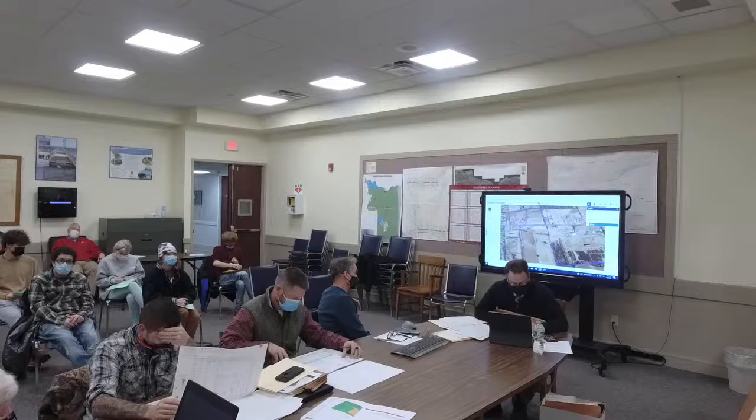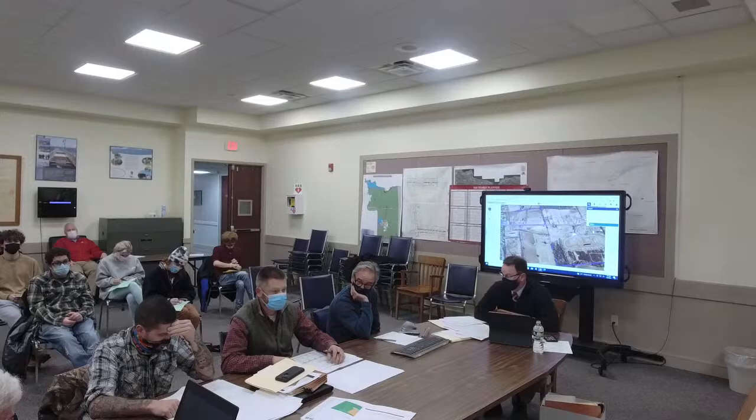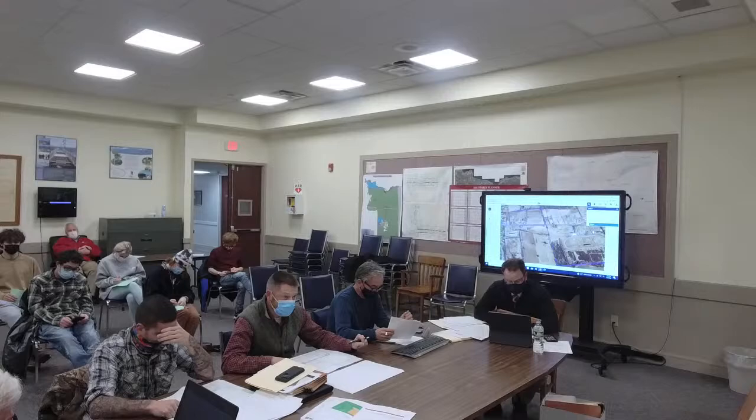On 112, there's not much different than what we've looked at, but a question has been raised outside about road widths that meet fire code. Major roads need to be 26 feet, minor roads need to be 20, and you're showing your main road to be 24, and these other ones to be less than 20. I'm raising that as an issue that we need to look at.